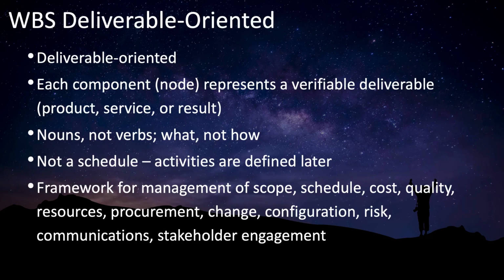procurement management. Any changes to the project scope will reference this work breakdown structure, both in reviewing and approving these changes, as well as in managing the implementation of those changes. It also serves as a framework for helping to identify and manage risks on the project. Certainly it includes communications, because you'll be referencing these specific details, including these unique numbers for all of these different deliverables, in your project communications. And it will help with stakeholder engagement, not only with communications, but also because some of these deliverables will be more related to specific stakeholders that need to be involved or aware.